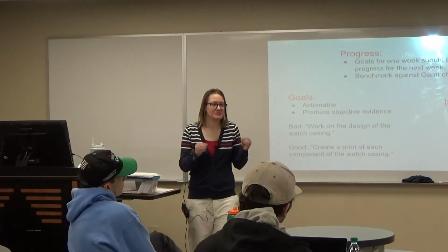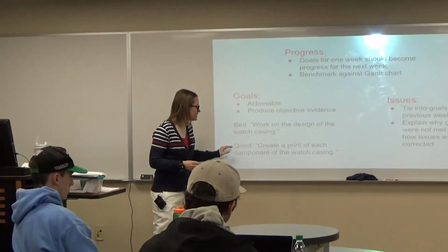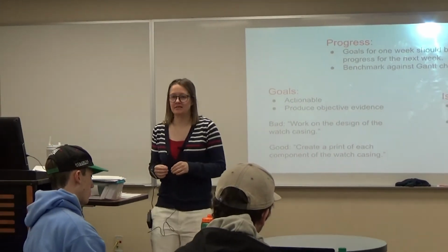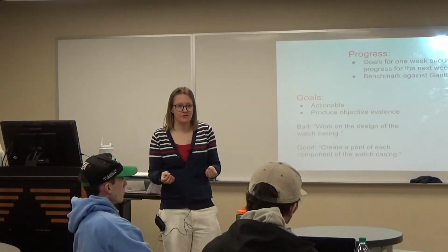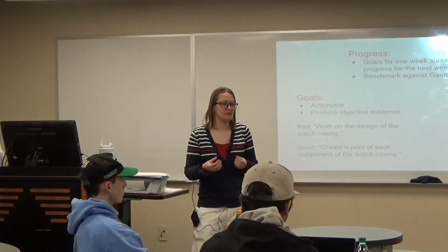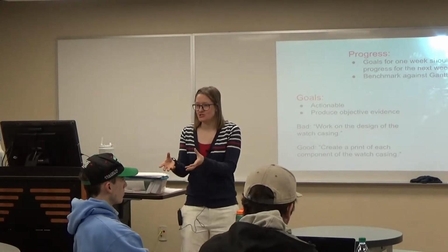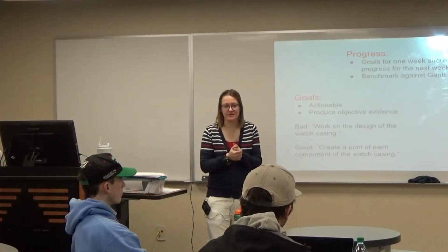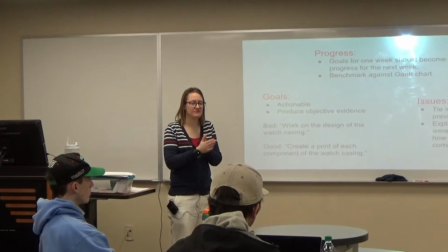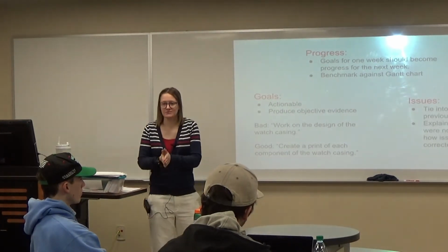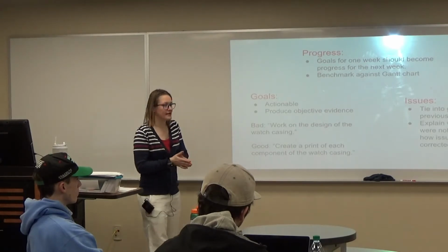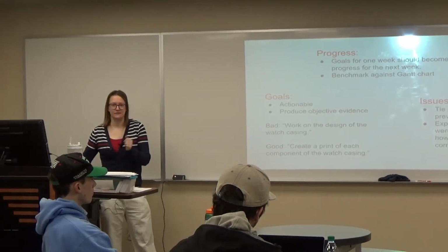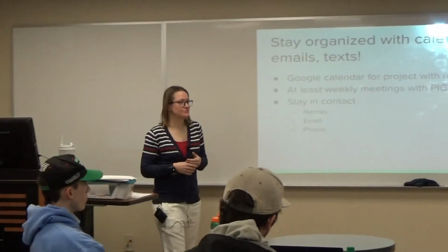But if you make a very specific goal, create a print of each component of the watch casing, that's something deliverable, right? That's something that makes somebody accountable so that when they come into the next meeting, they have something to show the work that they've done. Okay, so that's very important that you make specific, actionable items and that they're assigned to people, and that will hopefully hold them accountable for you to progress through your project.